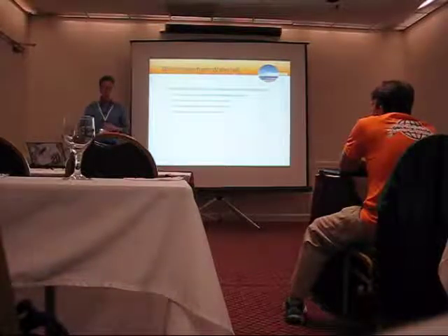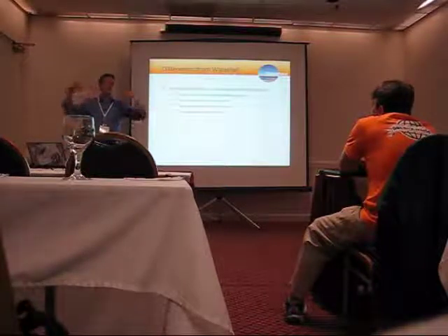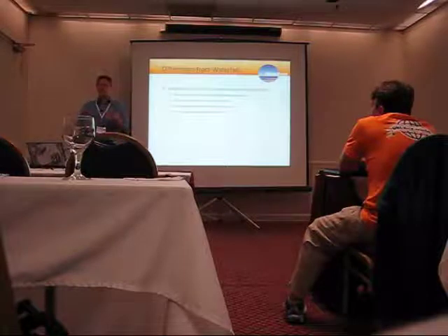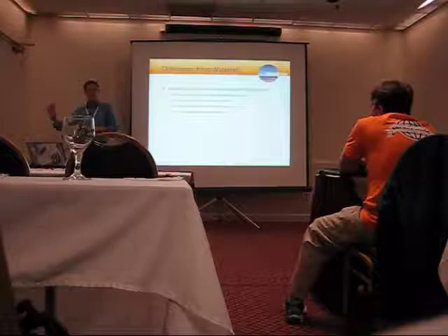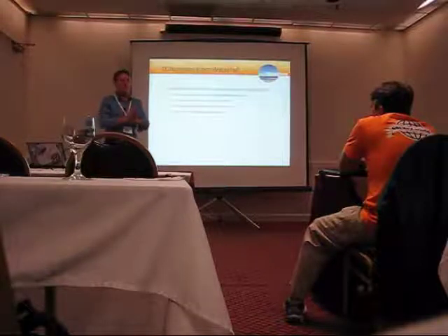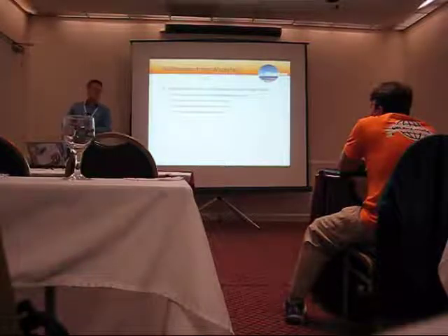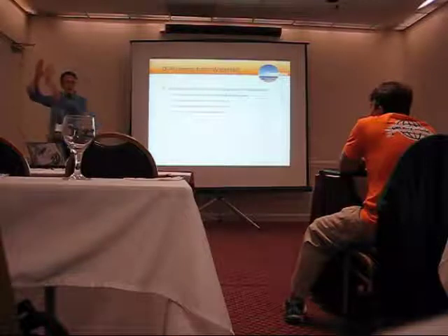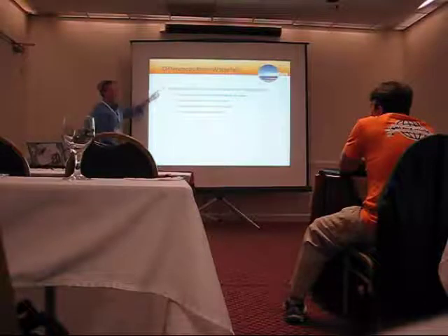The idea of the Waterfall Method is very similar to what I mentioned. The Project Management Institute says the way to manage a project traditionally is that you do everything up front. You initiate the project, which basically gets authority and funding. Then we plan the project. And in fact, if you were to study the PMBOK, the Project Management Body of Knowledge, you will find that of the 47 processes, 24 or 26 of them are all on planning the project. In other words, you do that before the executing process group. So in the Waterfall Method, you plan everything up front.